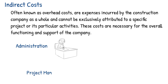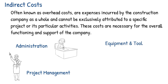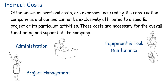Project management: salaries and benefits of project managers, project coordinators, estimators and other personnel involved in project oversight and coordination. Equipment and tool maintenance: expenses related to the repair, maintenance and depreciation of tools, machinery and equipment owned by the company and used across multiple projects.